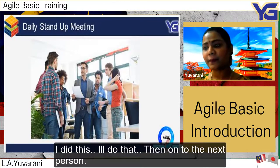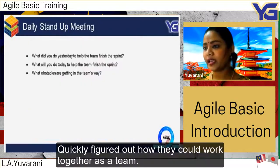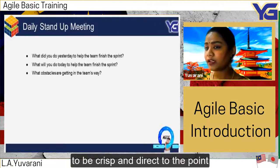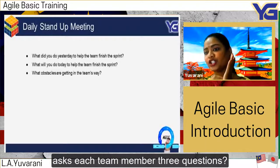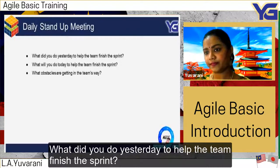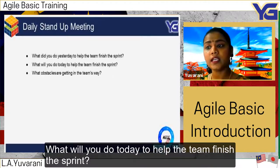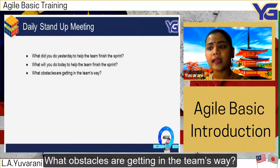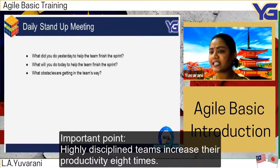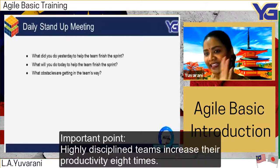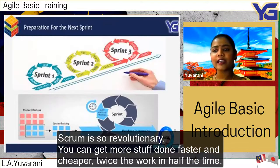During the stand-up, everyone actively participates — they stand up, actively listen, and speak, which keeps the meeting short. The scrum master — the person in charge of running the process — asks each team member three questions: What did you do yesterday to help the team finish the sprint? What will you do today to help the team finish the sprint? What obstacles are getting in the team's way? A highly disciplined team increases productivity eight times. Scrum is so revolutionary — you can get more done faster and cheaper: twice the work in half the time.